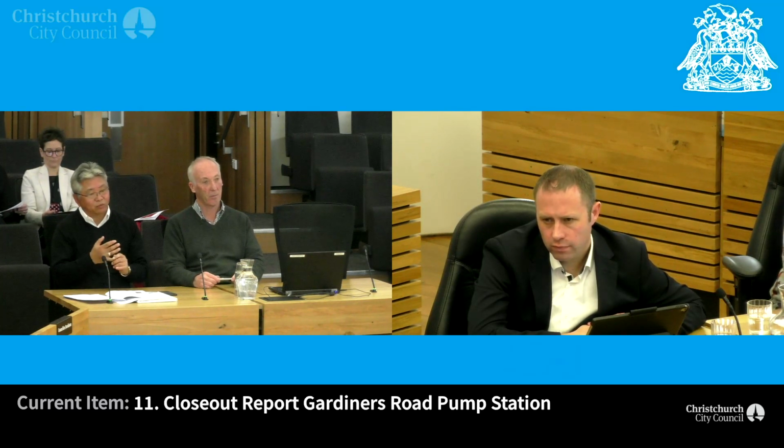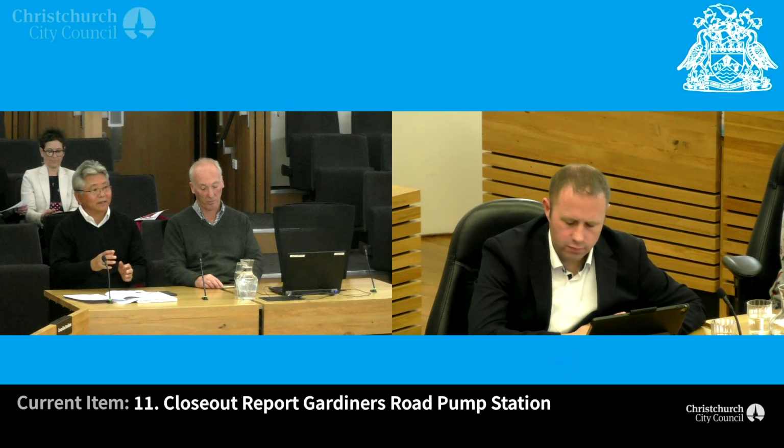No, so when the brief is provided for us to construct, the brief normally spells out what pressure, what flow rate, and why it's required. However, the currency of the brief sometimes needs to be checked. It's now 3 years since we started this project, about 4 years ago when we started looking at the land, and 4 years later things change, so the network has changed. So one of the lessons learned is, before we go out for construction, we need to check the currency of the particular set of parameters, and whether the parameters have changed or not. And so I think that's one of our lessons learned.